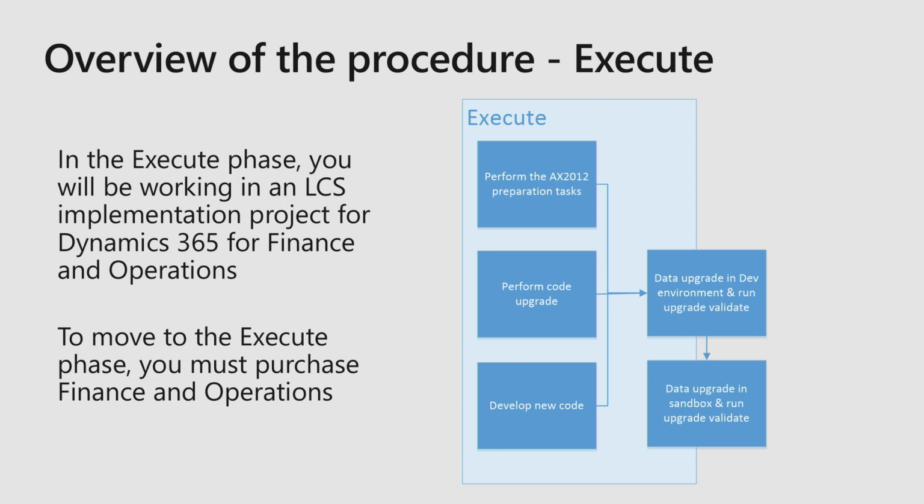The reason we recommend the dev environment is if you run into some issues during the upgrade process, it's easier to fix in the dev environment and reiterate because you have access to code and data. In Sandbox, you typically only have access to the data. So once you have a successful run, then we recommend you upgrade your Sandbox, and that's when you let all your users start testing, going through the D365 experience, and thinking about the business scenarios that they need to test and new functionality.